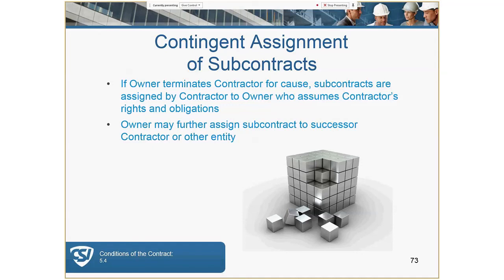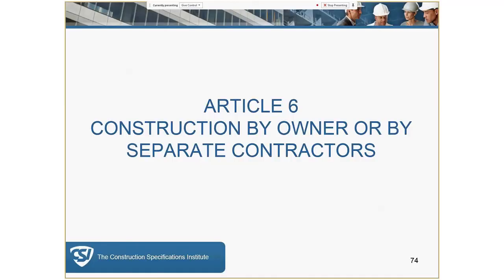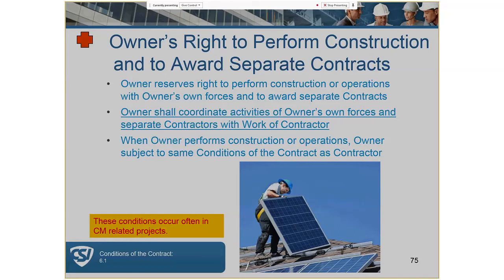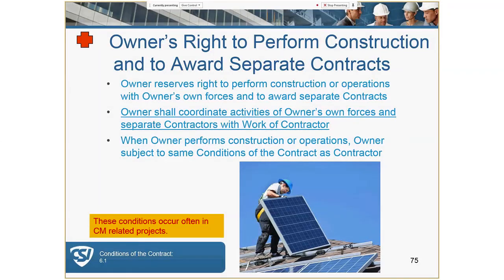If the general contractor is terminated, the sub can remain with the project and contracts can be reassigned to the owner or a different contractor. If the owner has the right to carry out portions of the work, the owner shall coordinate the activities of their own forces and separate contractors with the work of the contractor. It is the owner's responsibility to coordinate their own forces with the contractor — not the architect's, and not the contractor's responsibility to coordinate the owner's subs.